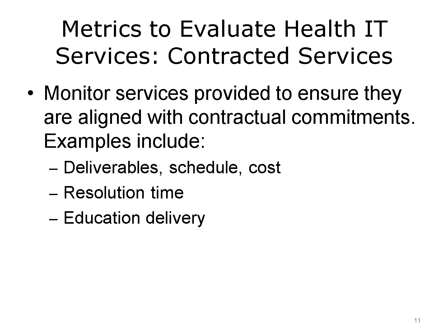Documenting in the contract all of the details, such as deliverables, schedules, costs, and acceptance criteria, prior to contract execution is critical. Contracted services should then be constantly monitored to ensure they align with agreed-upon commitments in the contract. It's important to designate one key individual who's responsible for ensuring that a service provider is meeting its contractual obligations.